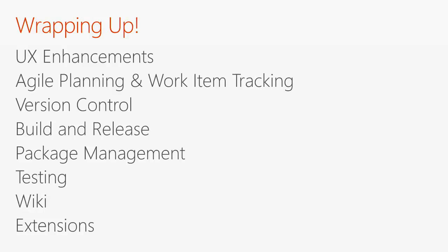I can do it from Lens, but I can't do it from Kanban. When I try to add them, it's only letting me add if it's under, say, the same team project. Yeah, so obviously the Kanban board is scoped to a particular area path and iteration, depending on whether it's a story or iteration. We don't have a good solution for that today. The best answer I've got is creating proxy items in your backlog that link to the other one, but it's not necessarily the same thing. It is something that we're aware of and we're thinking about. It's certainly a problem we have internally as well.